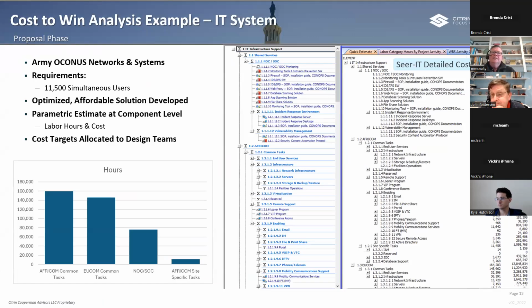And here's a pretty slick trick, a pro tip, if you will, if you're not doing something like this. If you have this kind of analysis, and your team should on complex development deals, cost volume is usually page unlimited. So that front end of the cost volume is a nice place to put things that you want the government customer to see, and you want them to not be able to unsee it.